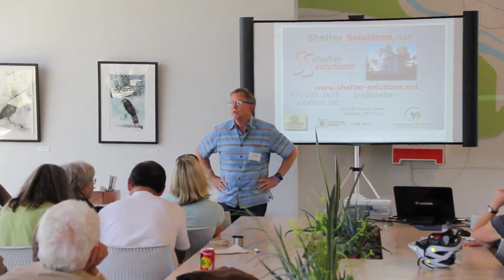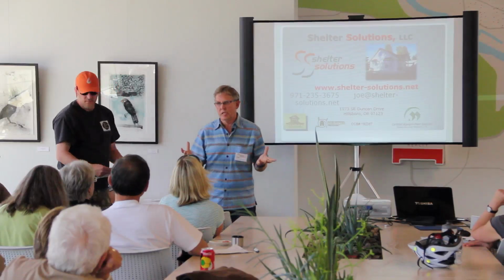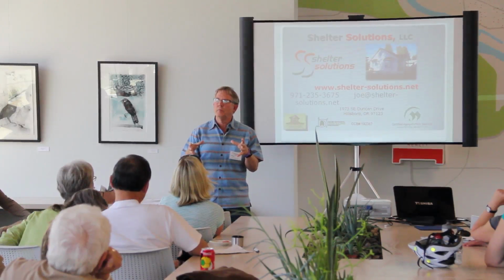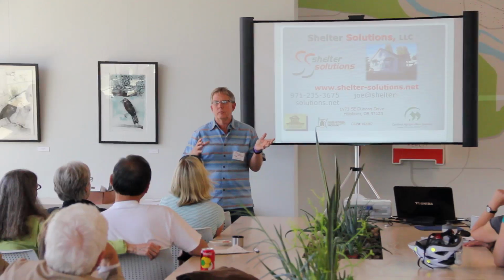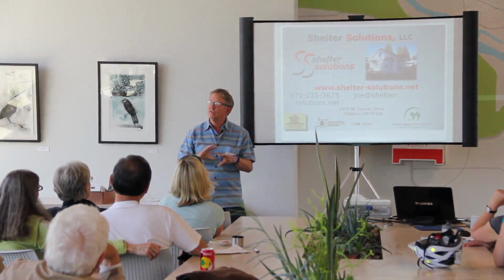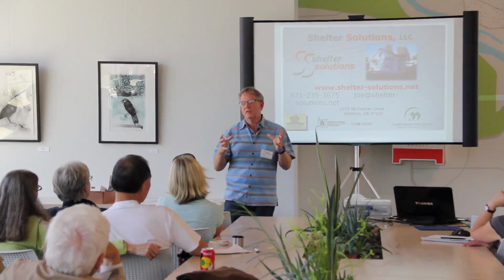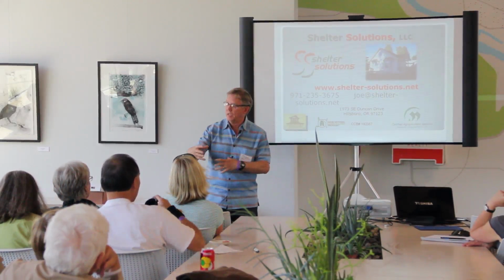Well, I'll tell you what I do know. Generally speaking, if it's an older garage, say prior to even 1970, I consider that an older garage. If you start putting a dwelling in that garage, you're pretty much going to come up to today's code. And more than likely, the foundation wouldn't meet today's code. The structure may not, as far as the roof rafters or the structural things. So you end up redoing a lot. That's not to say it's not worth doing, but I get calls all the time, I want to just convert this garage to an ADU, and you think they're going to throw some plumbing in there and slap some sheetrock up, and it's good. They're going to analyze it like it's a new structure. As far as the footing, you have to have an engineer verify the footing can handle it, or how you're going to expand the footing to make it work.